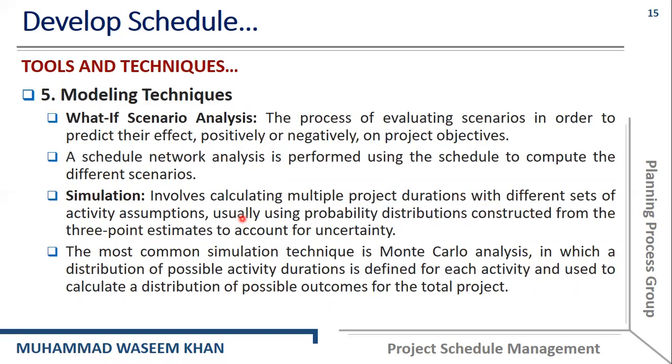And the common simulation technique that we can use here is the Monte Carlo analysis, in which a distribution of possible activity durations is defined for each activity and used to calculate a distribution of possible outcomes for the total project.